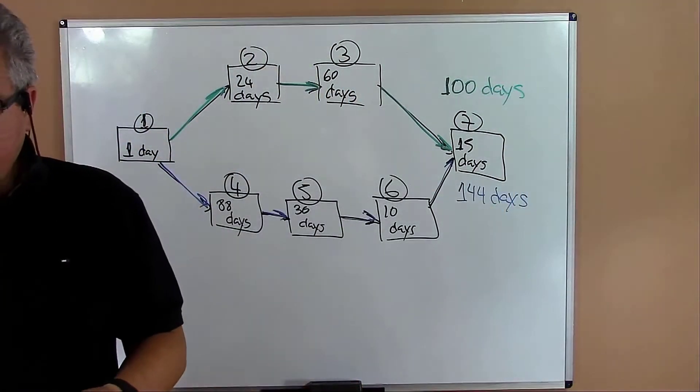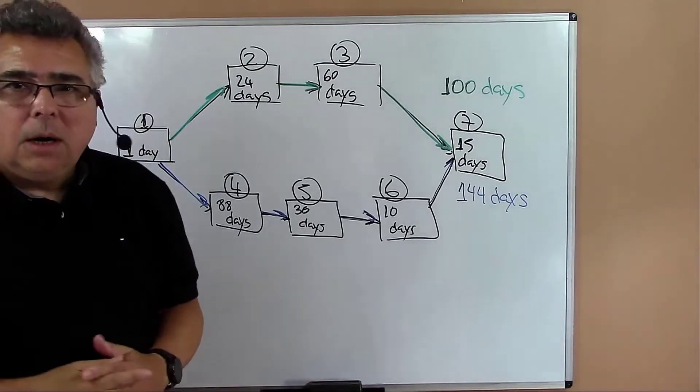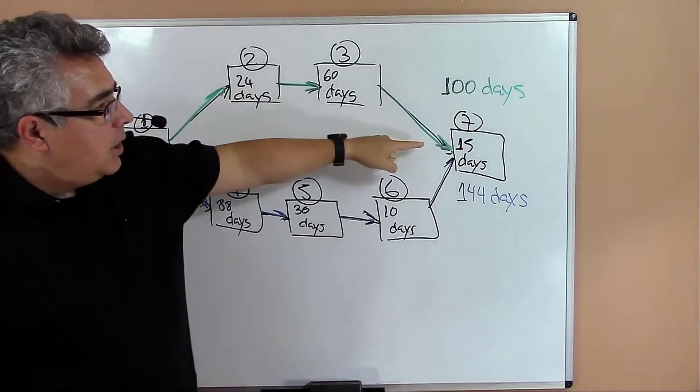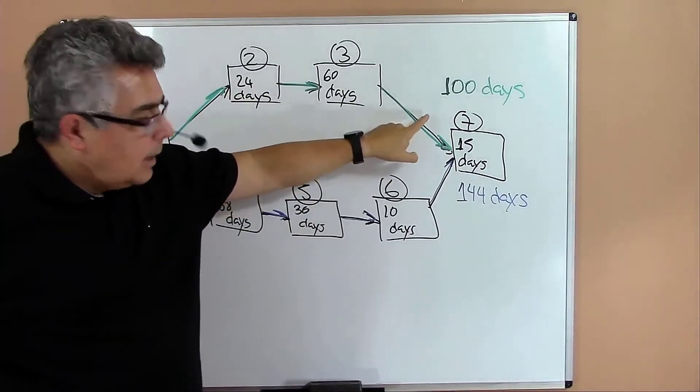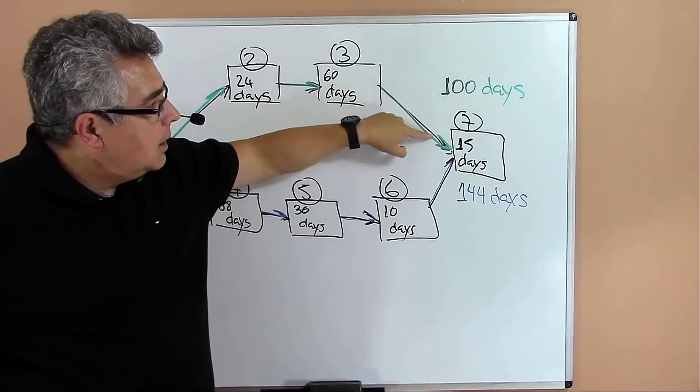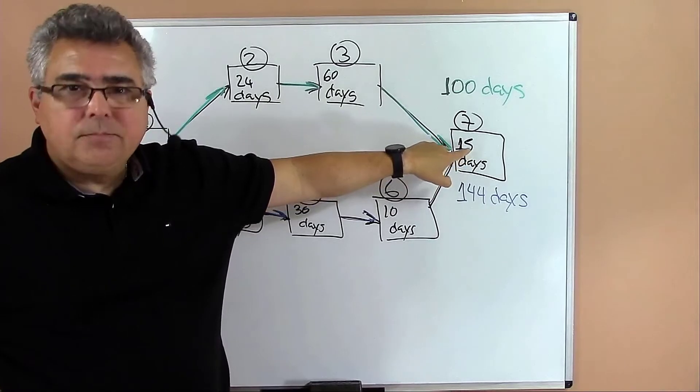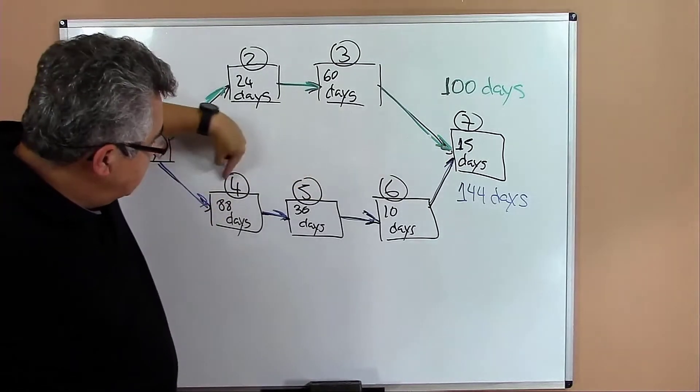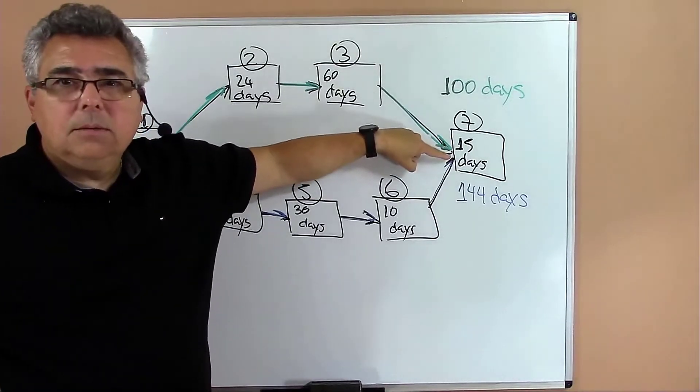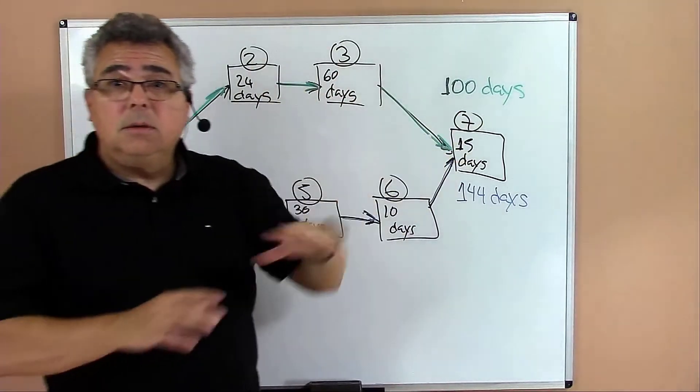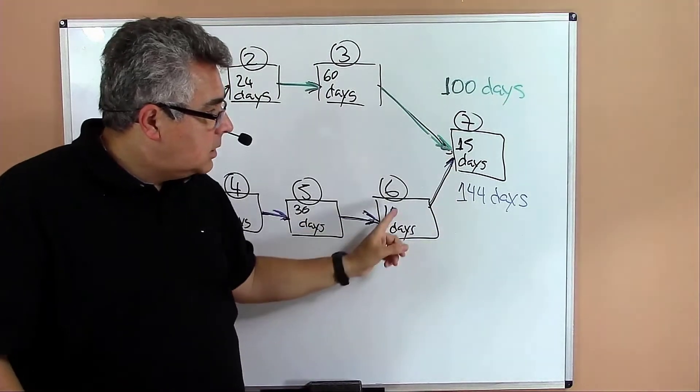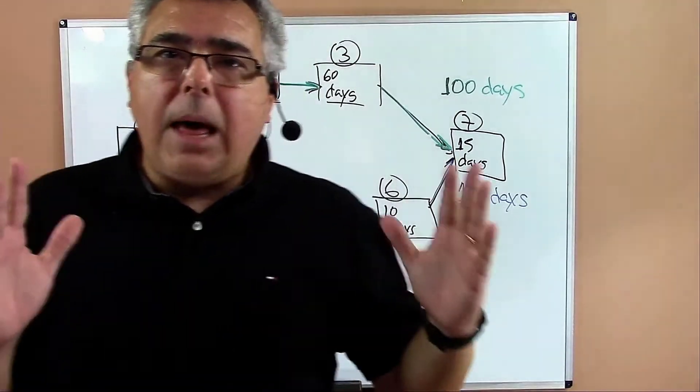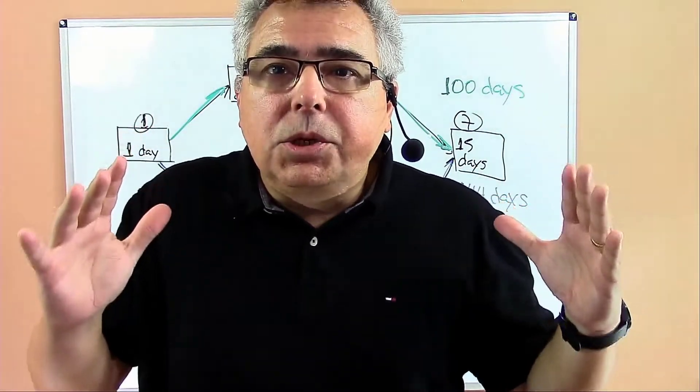The green is 100 days and the blue is 144, so the project duration: let's suppose I start the green, I can finish here. I arrive at that spot in exactly 100 days. Can I start activity seven? No, I have to wait until I finish all the activities in the blue path to start activity seven. So the longest path in the network, we call that critical path.